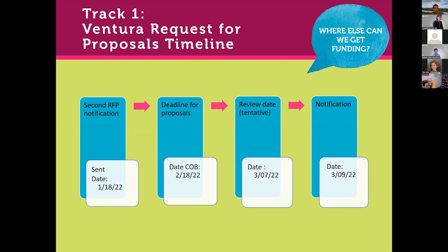So one way to think about this, let's say that you have a traditional infrastructure improvement program that you'd like to pursue, but you're not shovel ready. With this RFP, you can propose what it would take to get a shovel-ready project to go into the consideration for IRWIM 2 construction funding. And so this can help you develop that first list of things that I was just describing, the budget and the scope and all that. So you can propose a project here that would get you to a shovel-ready project that you could then apply for different construction funding from various sources, including IRWIM Round 2 or the State Revolving Fund.